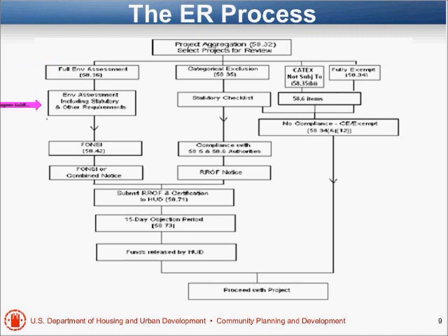Doing the environmental assessment is just part of the process, but you're also publishing notices of finding of no significant impact. You're making a finding, you're publishing a notice, and then you're submitting the request for release of funds and certification to HUD. HUD is waiting 15 days, and you can't actually start the project, make your commitment until HUD has released the funds and told you you can go ahead.